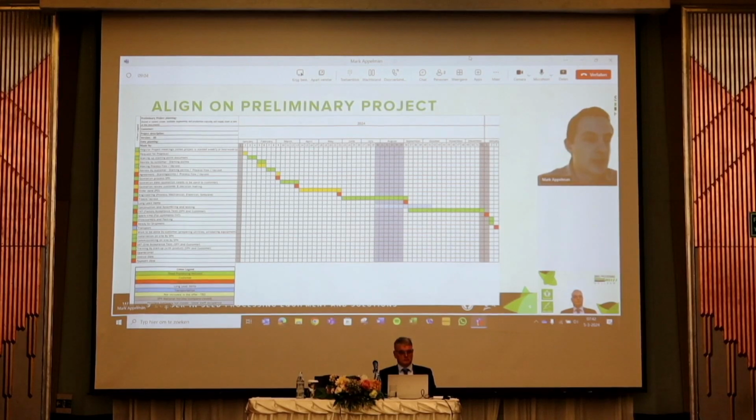So on the left side, we marked all the steps I mentioned earlier, from making starting points, but also making layouts, process flows, all that kind of things. Of course, it takes time. And this also has to be reviewed at our customer side, so that takes some time. And then if we say, okay, we have prepared everything, we expect to have a PO on a certain date, and then we as SeedProcessing need to do some engineering. Of course, we need review moments with the customer.